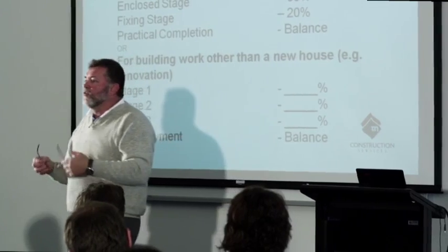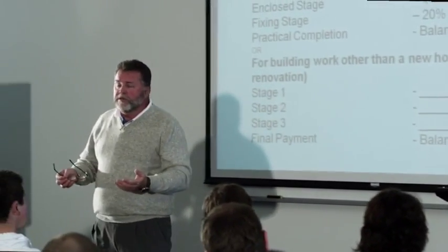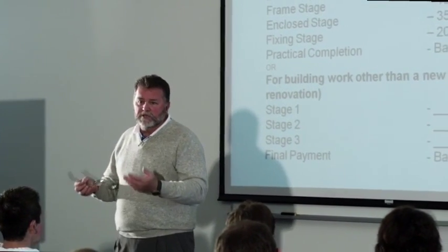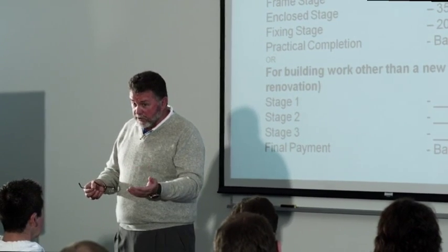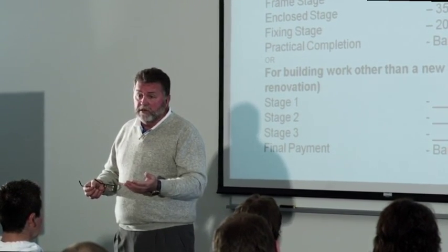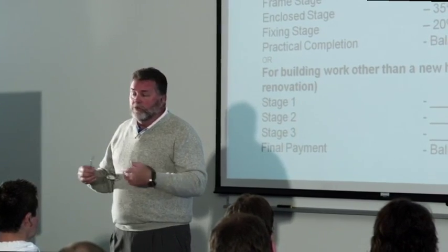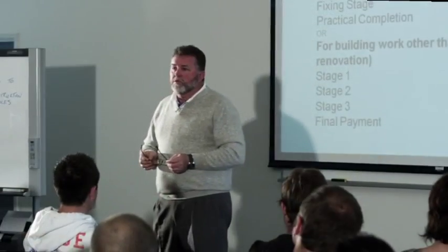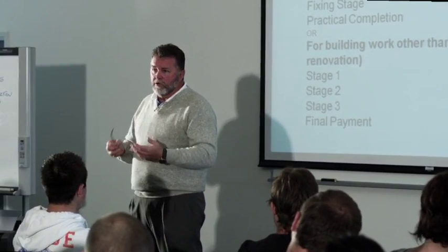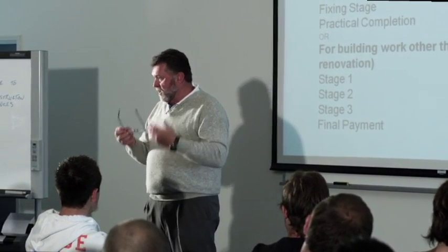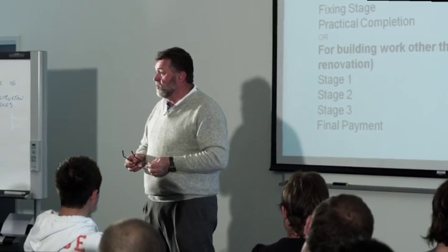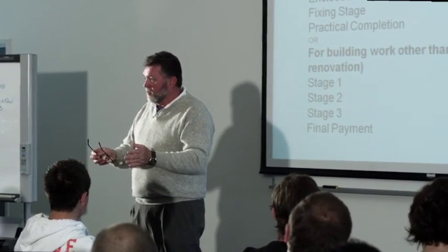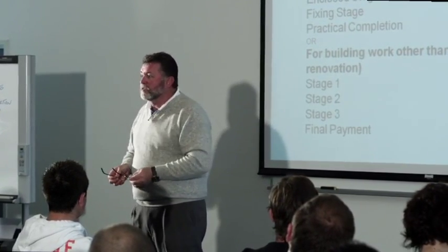The trouble is that you are all such big-hearted people that you believe you should be doing everything for the owner. Remember what I said earlier in relation to development applications, which a house removal is, by the way. So it requires a development application. That's not your problem. Your problem is to give them a product when they finally give you something to work with. The question was, if you came to the job and there was something wrong on the site which you found, then yes, you would need to do a variation with the owner for that extra work because your scope of work has now changed. Remember what I said? It's a scope of work, and Paul will talk about variations later on today.